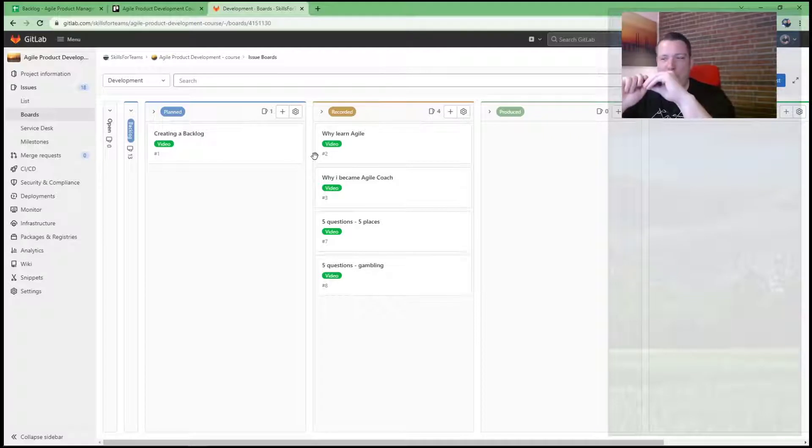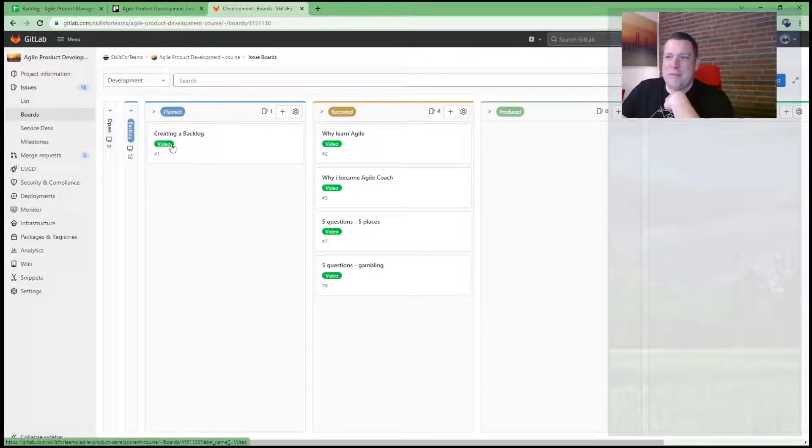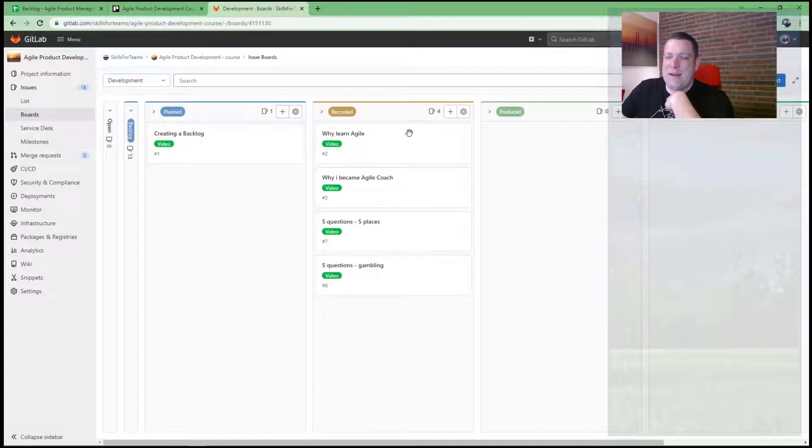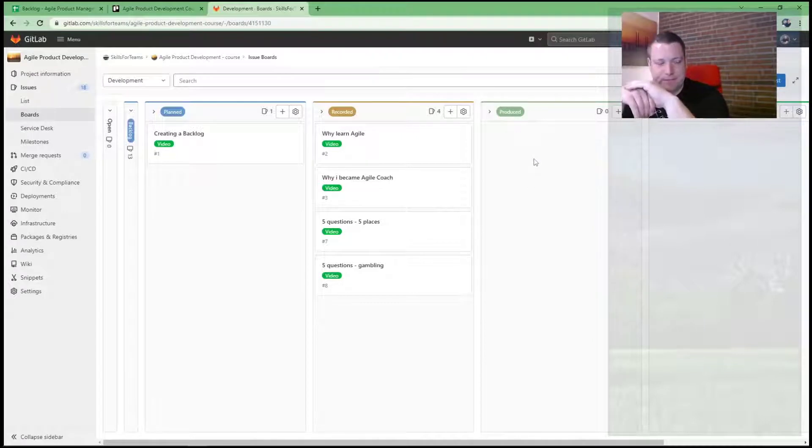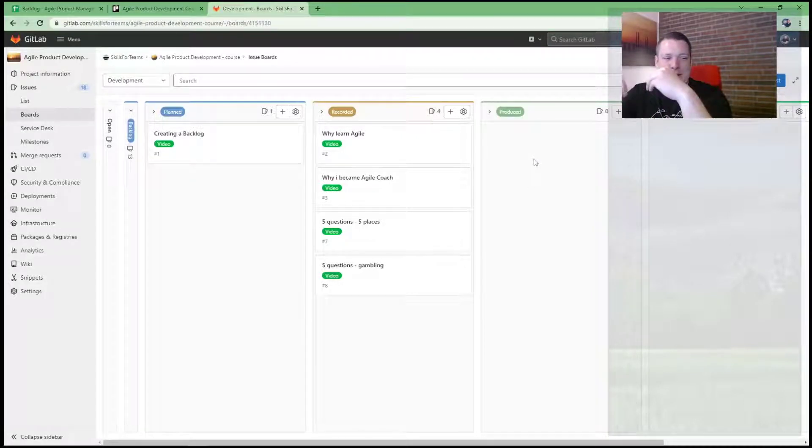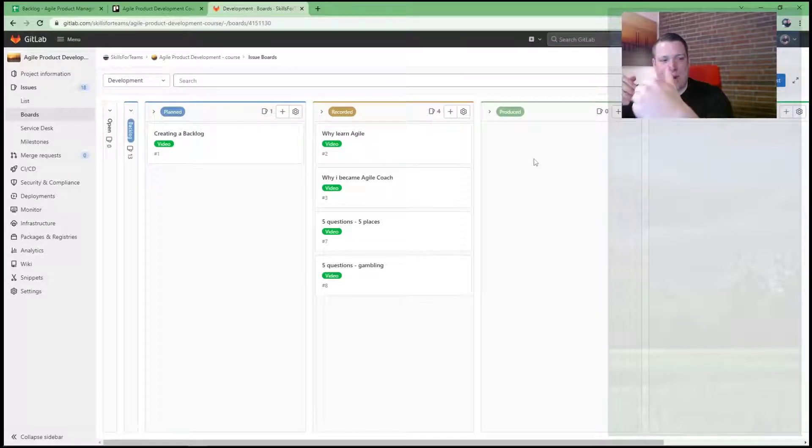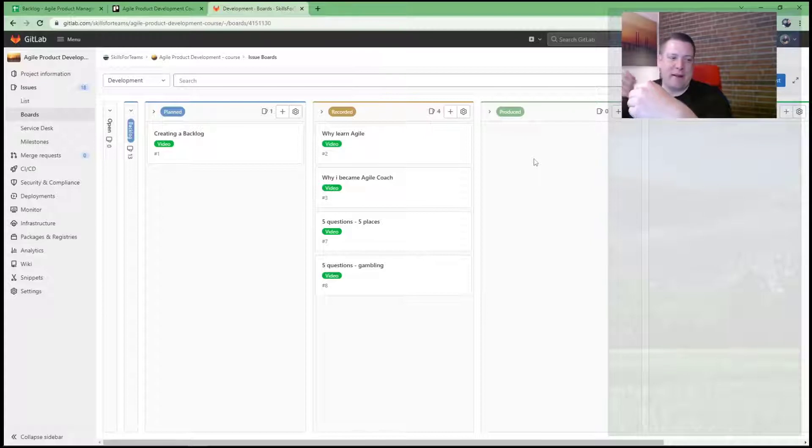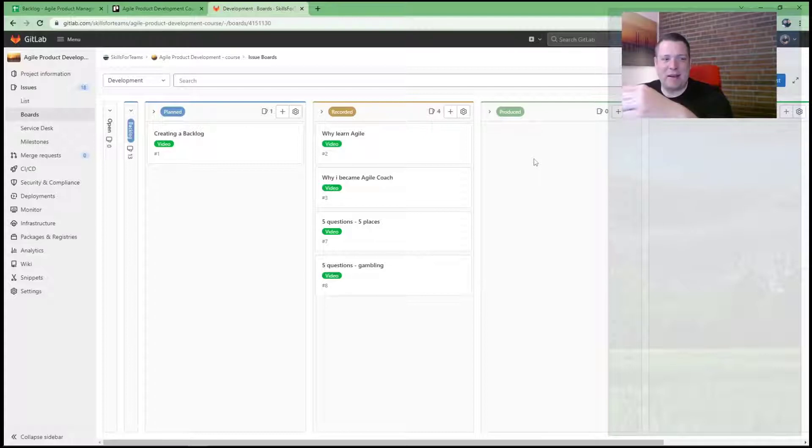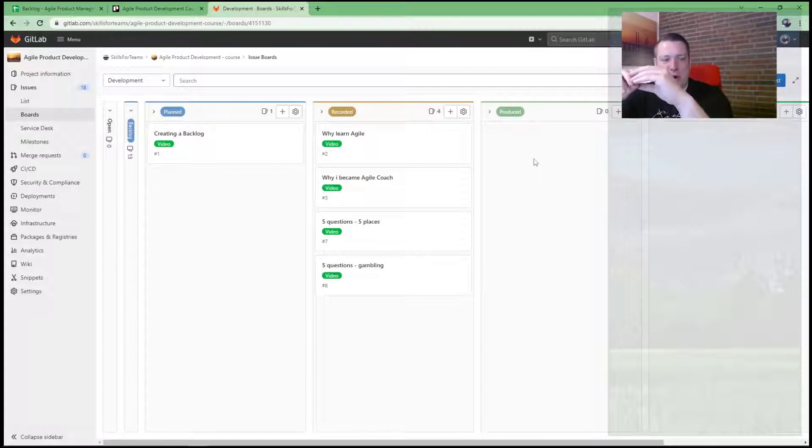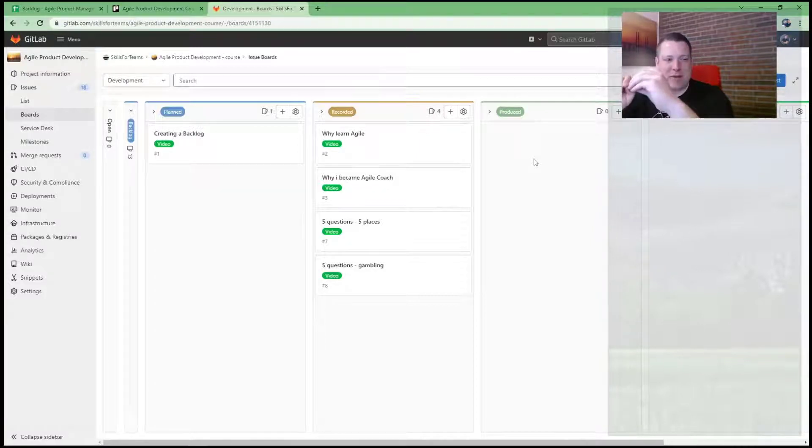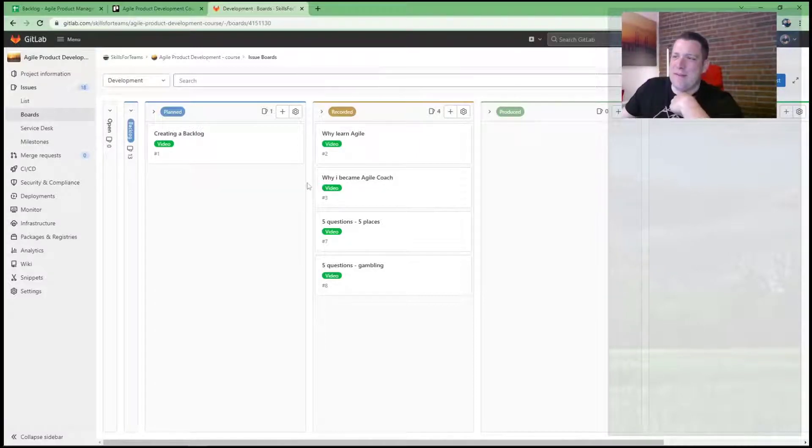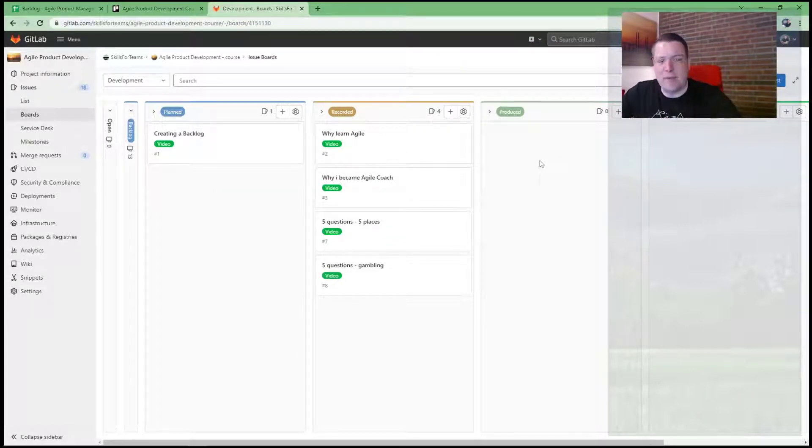And if you do it in an Agile way, this works with the pull principle. So the planned one gets pulled at one time and then is recorded. And the recorded gets pulled at one time and then gets produced. It's not assigned to a member because in Scrum, in Agile, the teams should self select their stories, their items which are to be done. And you will create a bottleneck if you assign too much tickets to one person. And with this one, I actually see that here in recorded is a bottleneck and there are not enough producers. So that's a better way. Otherwise I would maybe just have a producer and see here he has 10 tickets assigned. Here I have more opportunities to correct it.